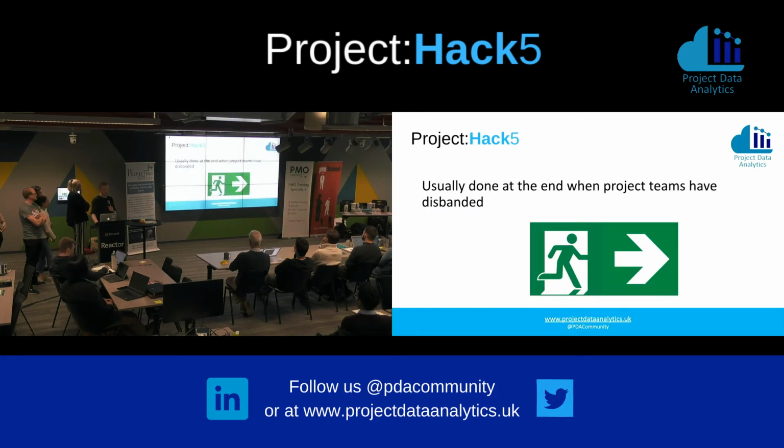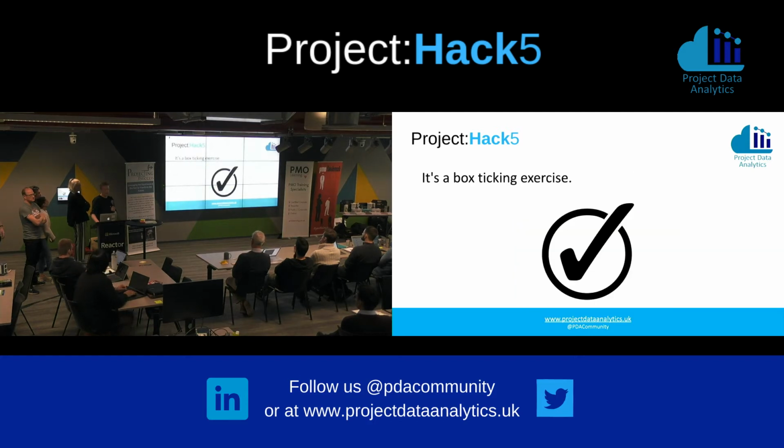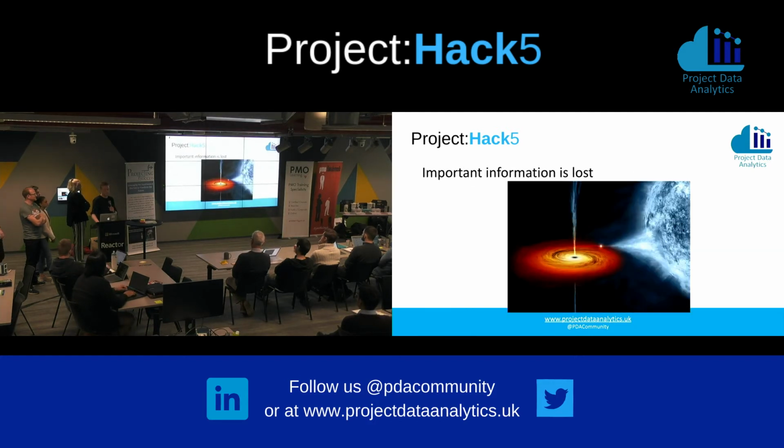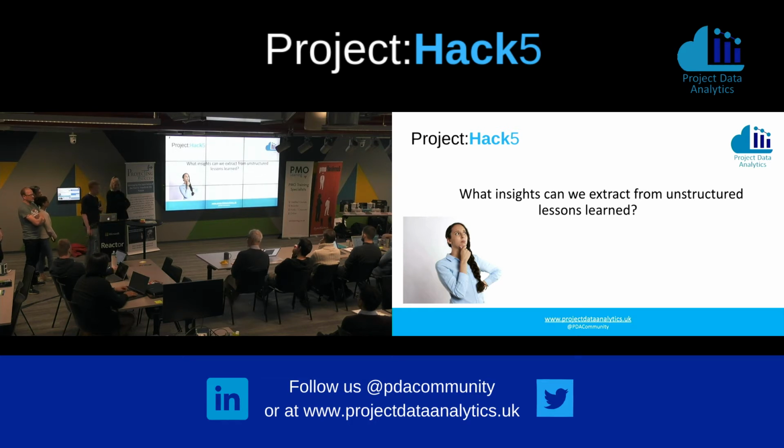It's usually done at the end, when project teams are disbanded. We've got unstructured information collected usually in very poor quality, and typically it's just a box-ticking exercise. Information is usually lost at the end, so it's very difficult to try and draw any conclusions. But obviously our challenge was to try and find what insights we can extract from the unstructured lessons learned data, which is what we've managed to do.